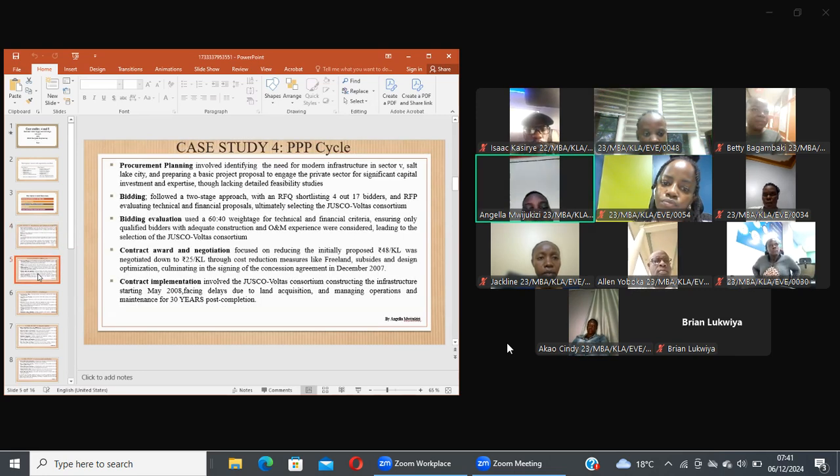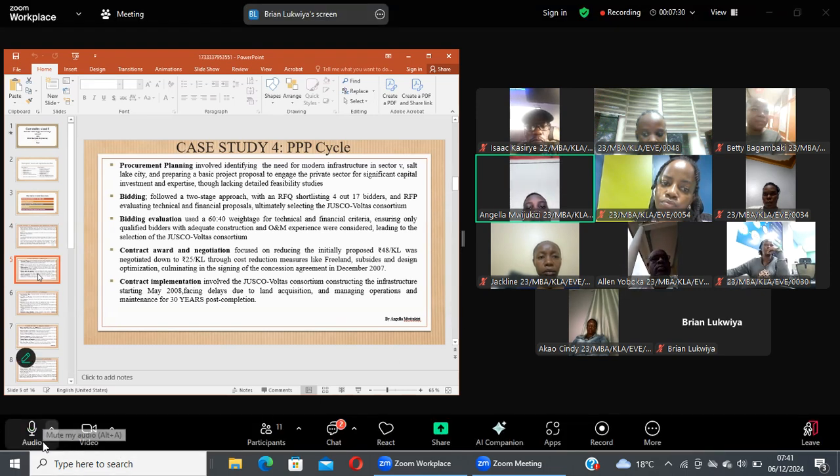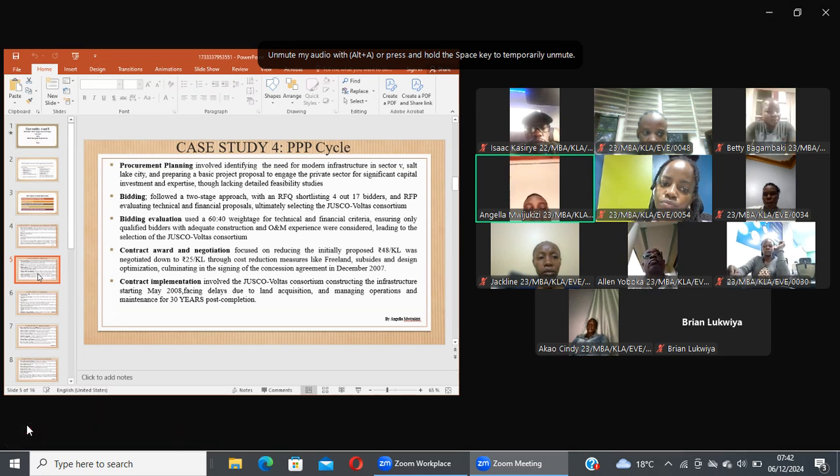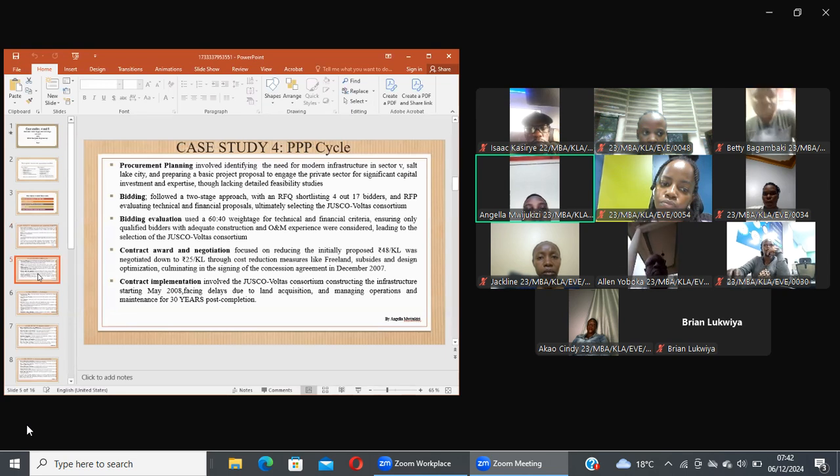Thank you so much, Joanne. In this case study, the PPP cycle that was followed, we have procurement planning, we have bidding evaluation, contract award and negotiation, then contract implementation. Under procurement planning, it involved identifying the need for the modern infrastructure, as mentioned earlier, in Sector 5 Salt Lake City, and preparing a basic project proposal to engage the private sector for significant amount of capital, investment, and expertise.